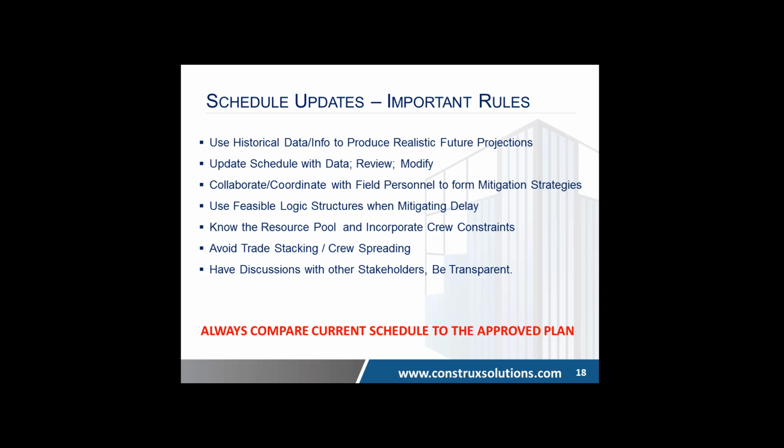Know the resource pool. When you are updating your schedule, be very certain that you're keeping an eye on how many people you can get to the site. I know I've sat in meetings where people say I can get as many drywall guys as possible. Sometimes that's the case. Then there's room. There's the idea of, can I fit 1 million trade contractors in this room? And if not, then your durations have to reflect that.